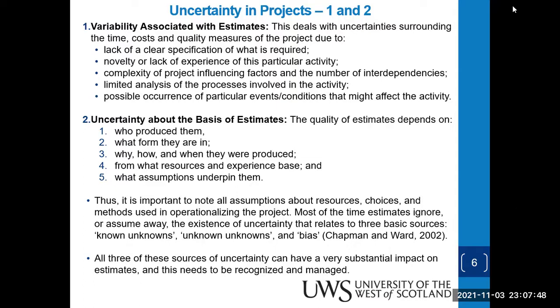So for example, you want to build a house, that's a project you want to start, the cost, if you don't know much about building, you need to find out. So the cost itself could also change because building materials prices could change. The time that you thought you could use 7 months to build, then COVID strikes. That's an event outside your control, which affects, you have to go into lockdown, you don't get the artisans, the masons, you don't get the clearance on time from the council to be able to build. So these are elements that could cause uncertainties or variability with the estimate.